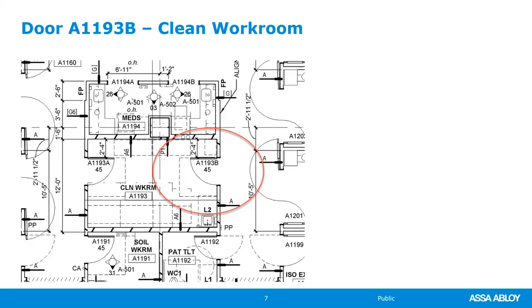It depends on what phase of design you are getting involved in writing the specification. Clearly, the more information that you have, the easier it is to write the specification. But sometimes when you write the initial specification, you don't have all the information, and then you'll have several different revisions until you get to the final spec released for bid.